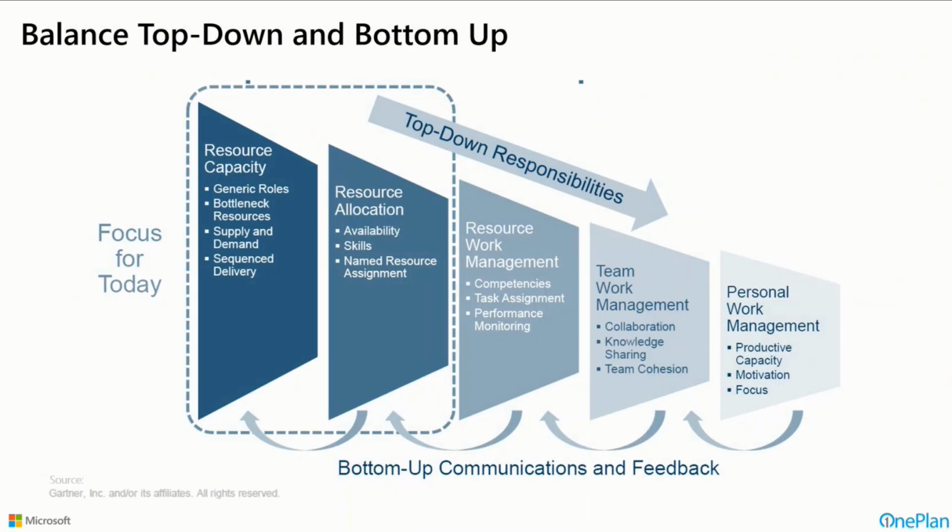Now, I talked about top-down maybe versus bottom-up type of resourcing. And early on, organizations may do more capacity planning from the top down, where I was describing at a project level, not down to detailed task, for example, what it is we need. And basically saying at that level, here is what we think we're going to use, maybe even track what we are using or what we have used at that level, but not go any lower than that.